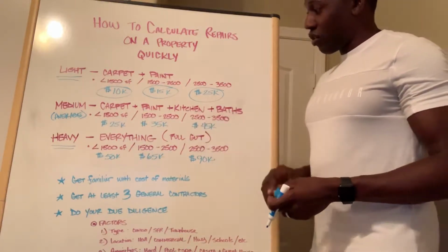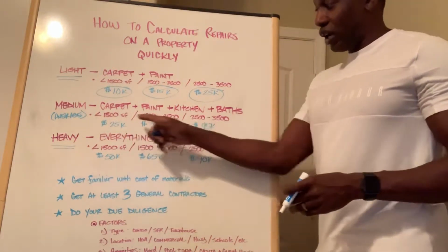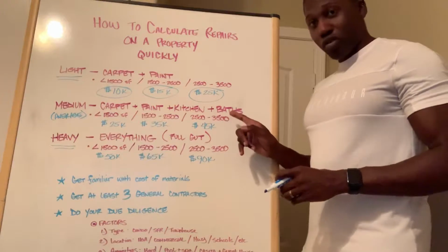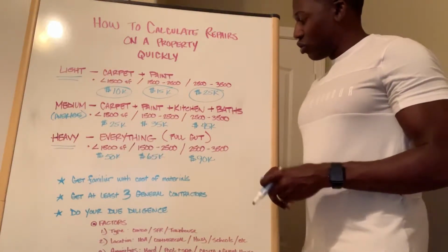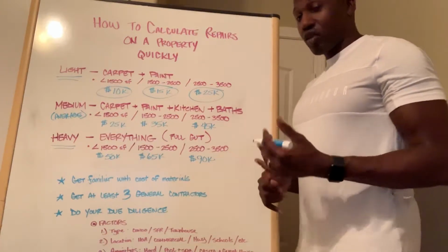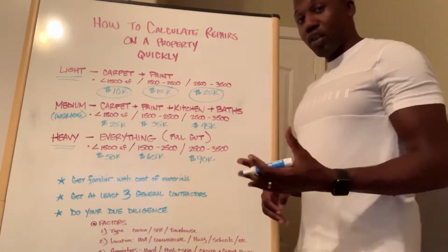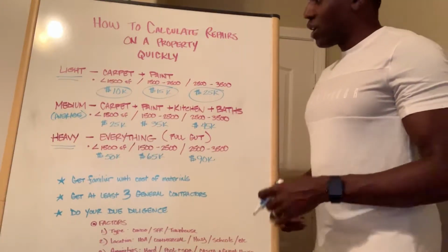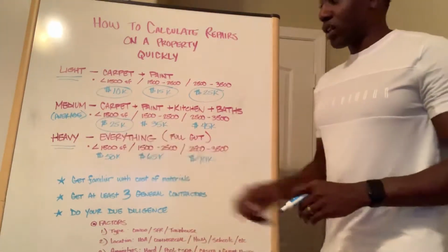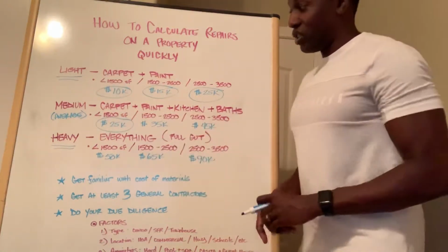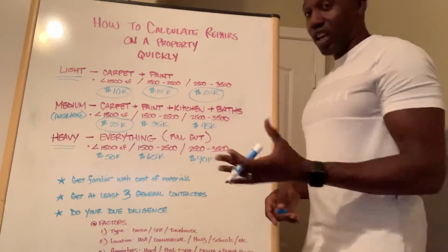Those are going to be your factors for these medium or average rehab costs here. And then the bathrooms: new sink, new cabinets under the sink, as well as maybe a new toilet, and then cleaning or a new bathtub or bathtub shower combo. So here we've got less than 1,500 square feet. That's going to be approximately $25,000 in rehab remodeling costs there. That's just the average.